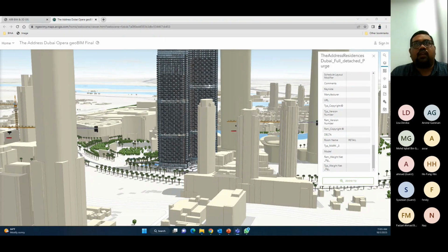From that BIM schedule, for example, in the Intel project that we are doing right now, our BIM model, the 3D digital model for each level, must be approved 3 months before the physical work begins. So you do a backward calculation.